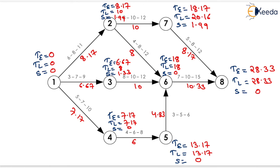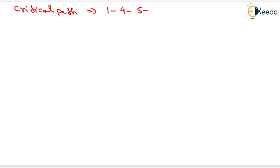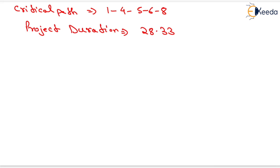We have calculated the TE, TL, and slack for each event. The events having 0 slack are known as critical events, and the activity joining the critical events is known as a critical activity. Activity 1-4 is critical because the slack of events 1 and 4 is 0; similarly 4-5, 5-6, and 6-8 are critical activities because their slack is 0. The critical path is 1-4-5-6-8, and the project duration equals 28.33 units. Thank you very much, students.